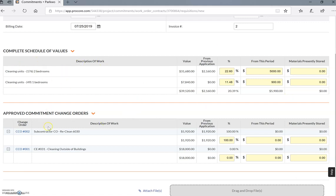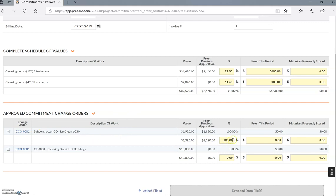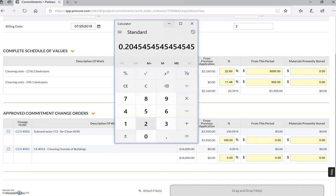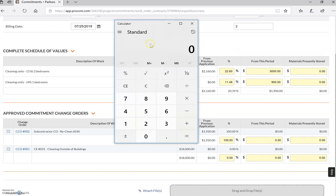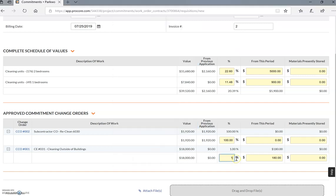Here are your change orders. For this one, this was a re-clean that we did a change order for. This already billed 100%, you obviously can't bill any more for that. This is a cleaning of the outside of the buildings. There's 18 buildings at $18,000. Let's say we're done with two buildings, so it's 2 divided by 18, which is going to be 11%.